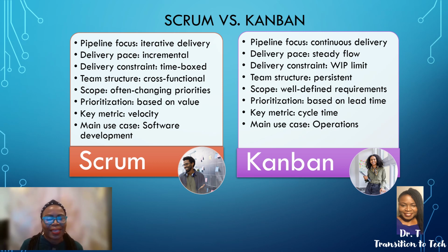So Scrum is an approach to project management that allows for an iterative and incremental delivery of solutions over time, and the constraint being time boxed intervals. The work is iterative in the sense that there are a set of practices that the team goes through in order to deliver, and there are inputs and outputs to this process, and this process fits within the time box period. So the time box could be 2, 3, or 4 weeks, depending on how the organization decides to implement Scrum.